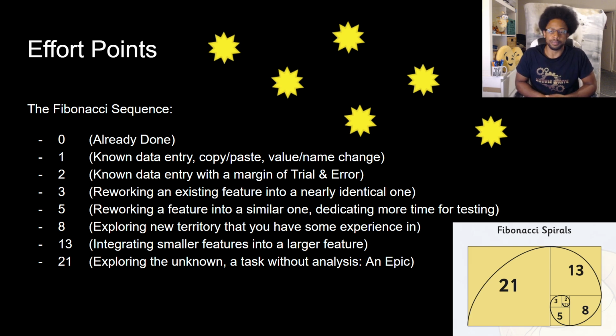Then I might say I also want to add a teleportation gun. That is an entirely different mechanic, but it requires the same mechanics of the shooting or the laser gun, except instead of destroying an object, it's relocating the character, or it's relocating another object to a location. Then you have to consider all the different ways that can bug out: objects traveling through each other, there's not enough space for an object to go there. So I know that's going to be far more difficult, so I'd rank that as an 8.